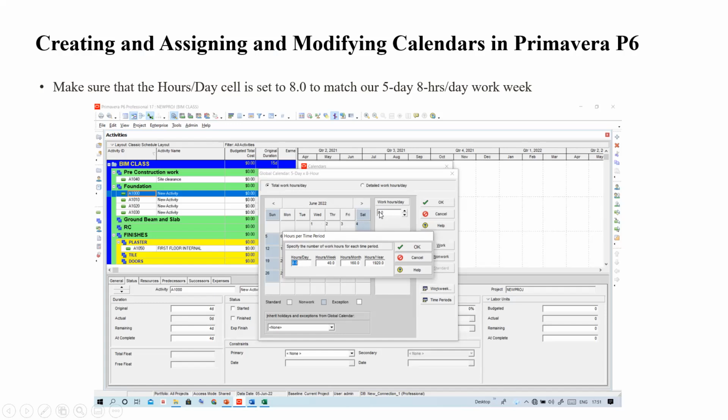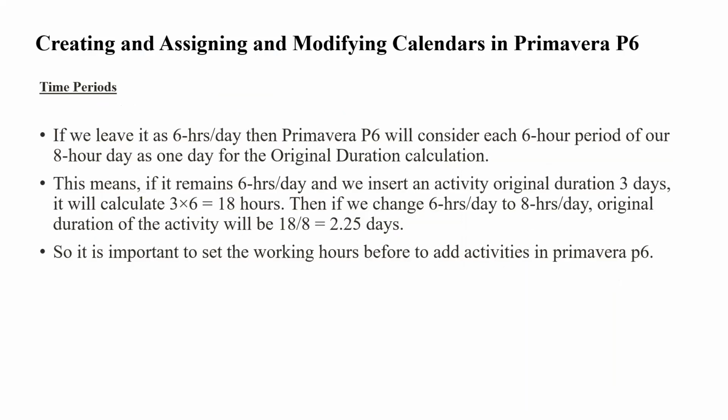If you give, you have to give that 8 hours, and if you give the 6 hours at this place, then during our durations and activity, we will face some difficulties. So that means the important part is the hours per day, not the other things. Okay, thank you.